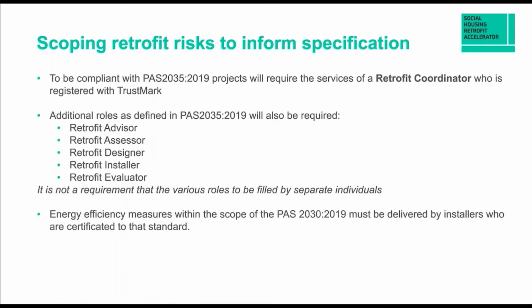Okay, so to be compliant, projects will require the services of a retrofit coordinator. As I mentioned earlier, this is one of the roles that needs to be registered with Trustmark. The retrofit coordinator, briefly, is a kind of project manager for retrofit projects, and needs to be engaged from the inception of the project right through to delivery and handover back to the resident.